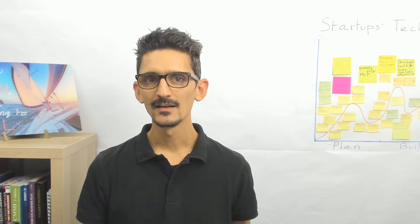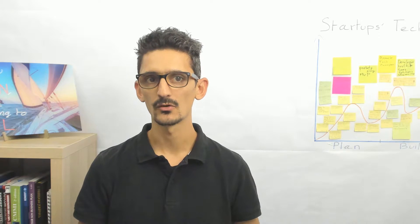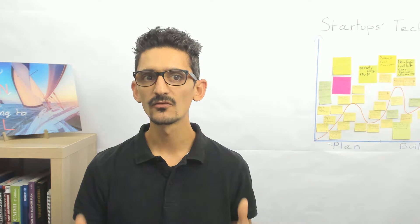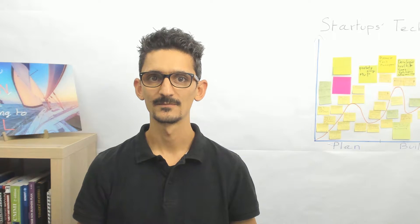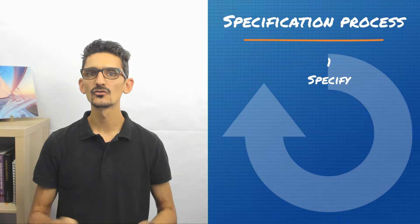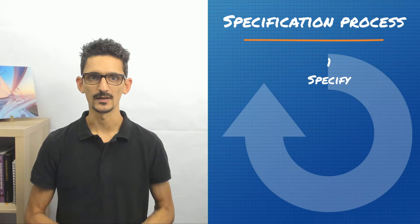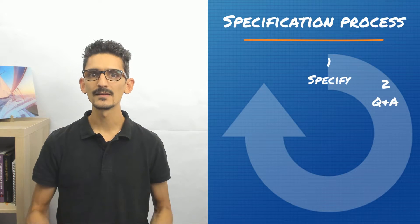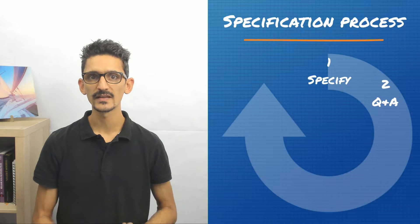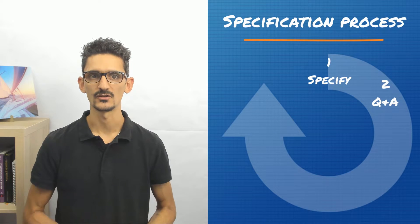And you know what? With all that said, tools aren't that important. What is important is the following specification process. First, specify new screens or features, the things you want to develop next week. Then, in a weekly meeting with your provider, discuss your specifications and answer their questions.